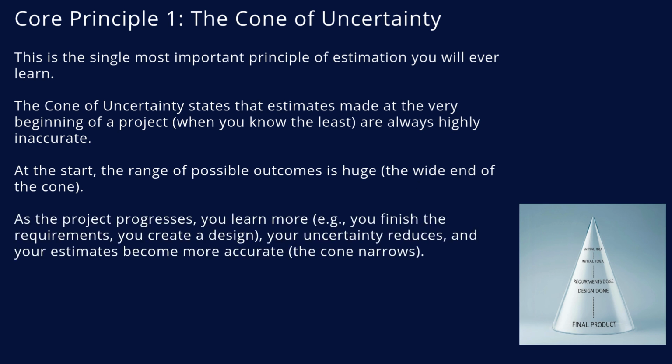But as you move through the project, you learn more. You gather the requirements. You create a detailed design. You build a prototype. With every unknown that you make known, you reduce uncertainty. As uncertainty decreases, the accuracy of your estimate increases, and the cone gets narrower.